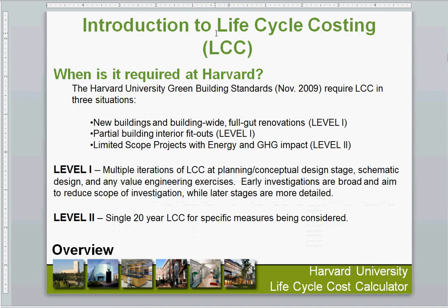So when is it required at Harvard? Harvard has a set of university green building standards that were established in November 2009 that require life cycle costing in 3 separate situations. One would be a new building or building-wide full gut renovation. So this is a ground-up facility, something completely new, a complete overhaul or major renovation. For those familiar with LEED, sort of a LEED for new construction type project.